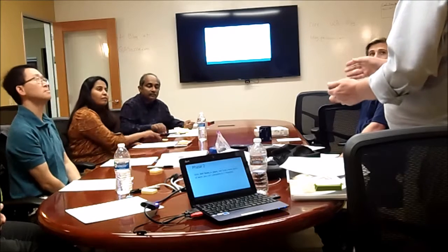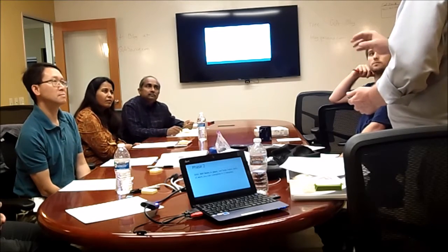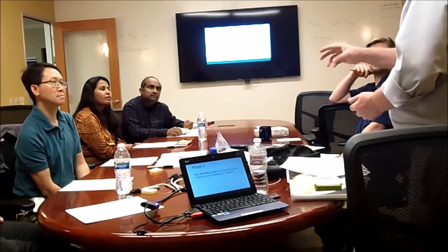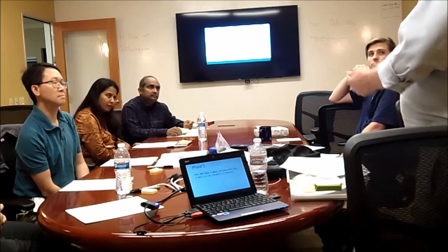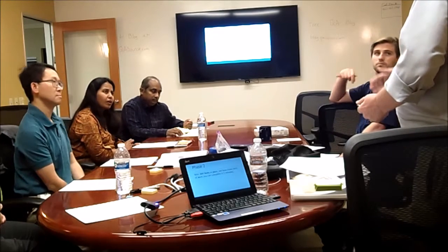If this were a software development organization, unless it was very small like this and you had only one person per job, then you would probably have higher numbers as WIP limits. For example, it's very common to have the WIP limit be the number of people that are in that operation. So 3 developers, you might go up to 3, like that. That's the next more complex thing than this. So thanks for letting me get that out. Let's just start again. Ready? Yeah. Begin.